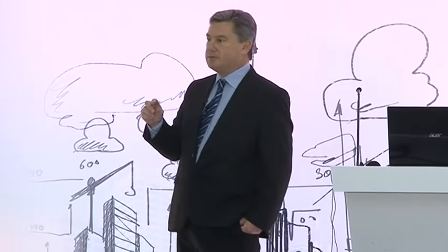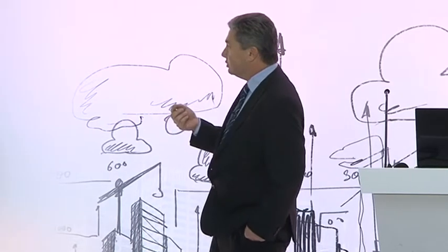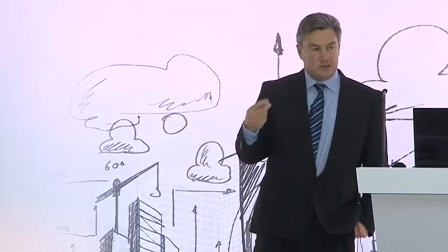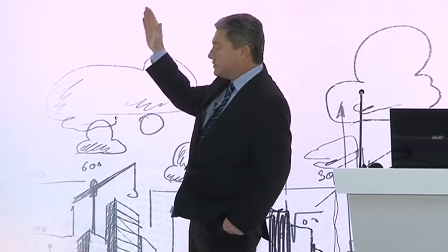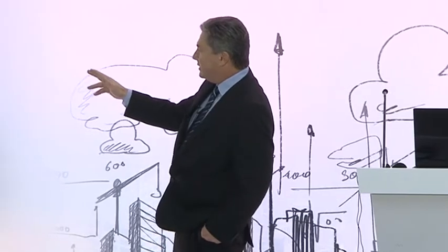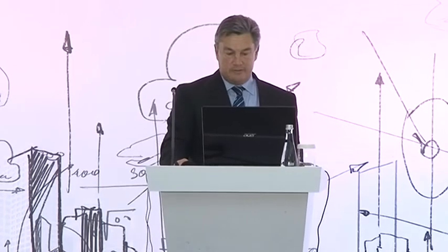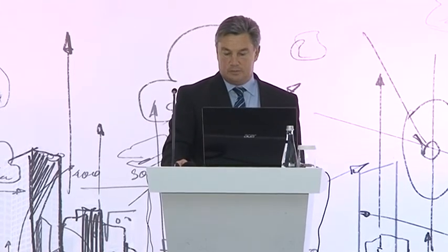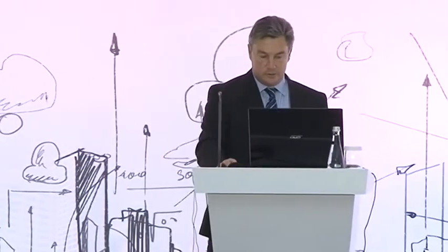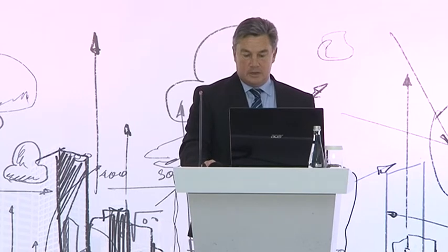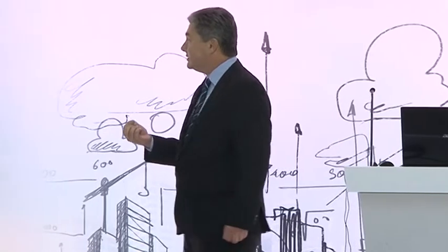So we're trying to make this more than a reporting tool. It's meant to be an interrogation tool as well, so that we can actually take remedial action, see what's going on, see if we can improve on things. So as I move my mouse up the curve, it's going to tell me which activities are happening at that particular point, along with a variety of information, such as planned start, planned end, early start, early finish, the work involved, the resources involved. So that's all the information that's come from the Primavera or the Asta database.